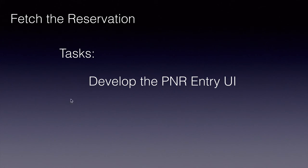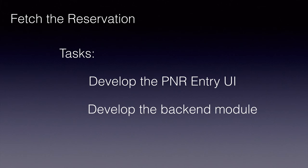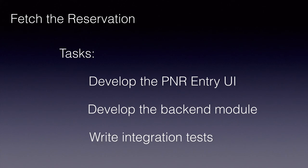This task breakdown can be done during the sprint planning or during the sprint itself. 'Develop the PNR entry UI' could be one task under the fetch the reservation story. 'Develop the backend module' is the second task, and finally 'write integration tests' could be another task.